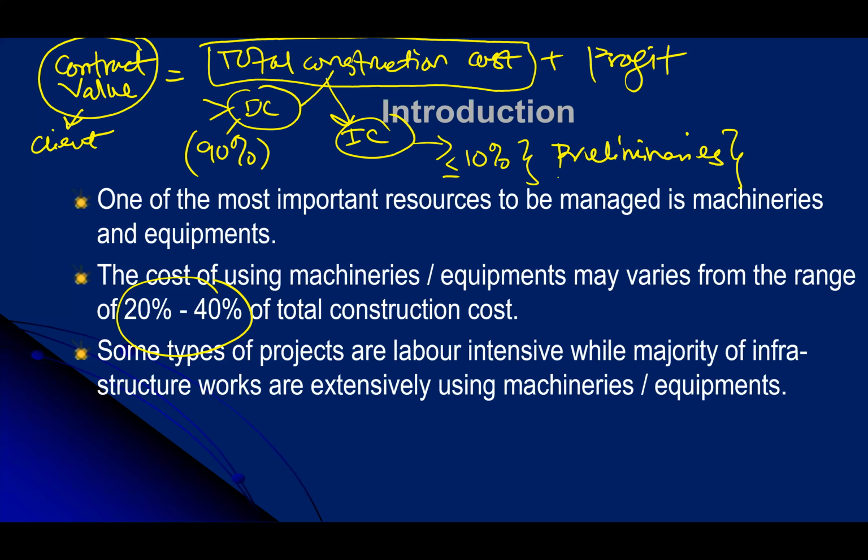So you just imagine, let's say the contract is about 10 million. Contractor total cost would be around 9 million. The profit could be around 1 million. So 1 million out of 10 million, that would be around 10% of the profit. This could be, we can say, about net profit. Normally when contractor put the profit, in Malaysia, they normally put higher amount because of the poor control. At the end of the day, the targeted profit might not be around that figure, but whatever it is, they still make money from a project. Okay, so let's say 10%.